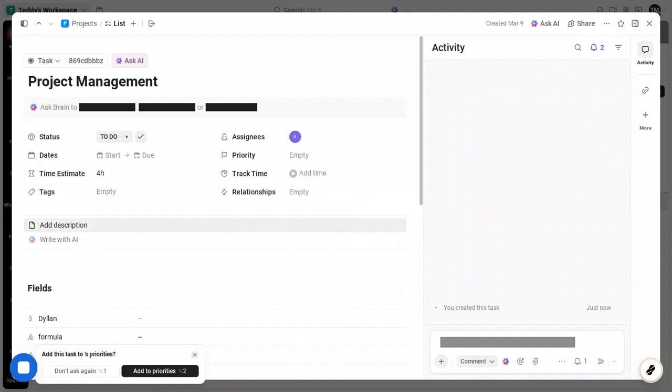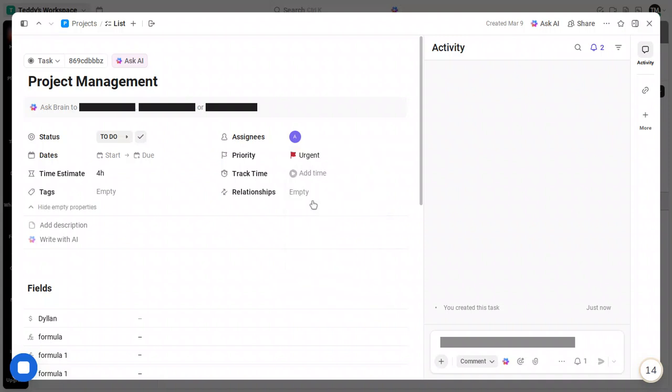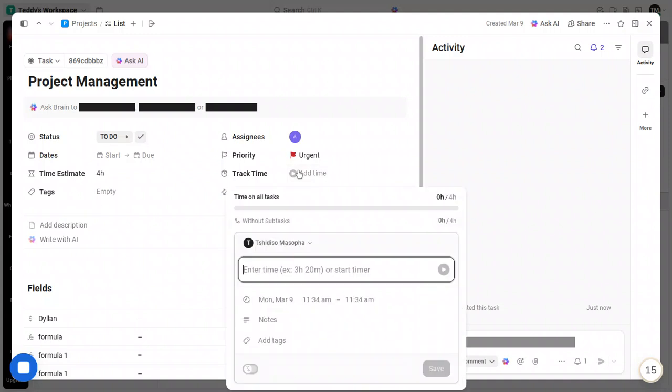Let's add a time entry so tracked work lines up with the estimate. Use the Add Time option, then enable the time tracker if you haven't already. You can start the timer to track work in real time, or log a manual entry if you've already done the work. Set the tracker now so it's ready to run when you begin. Over time, tracked hours compared to estimates will help you spot patterns and adjust your planning. If you stop and start throughout the day, that's fine.